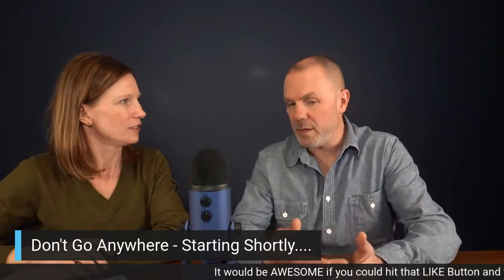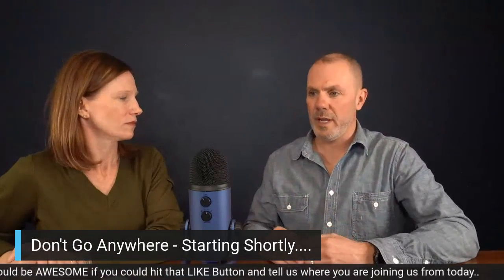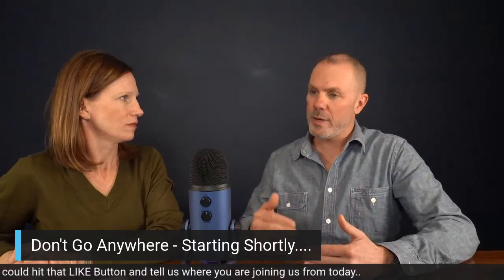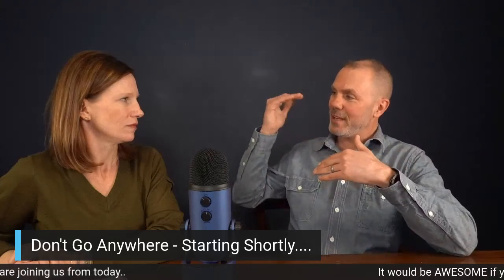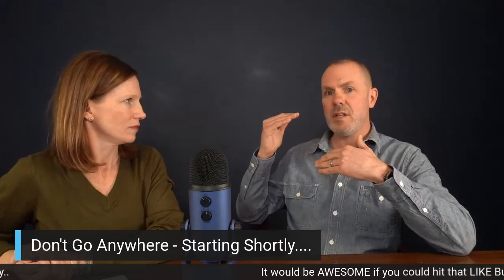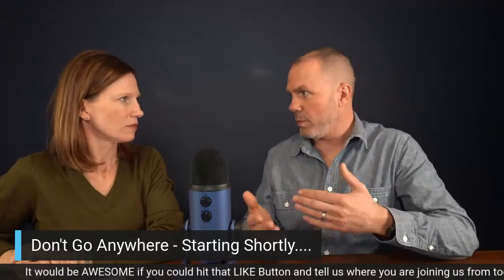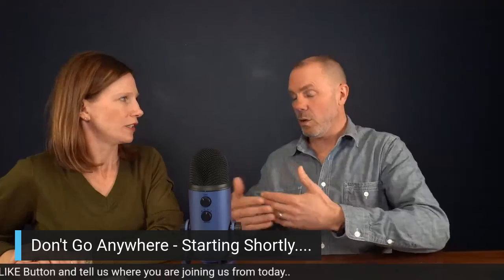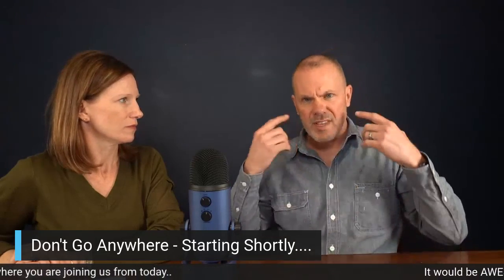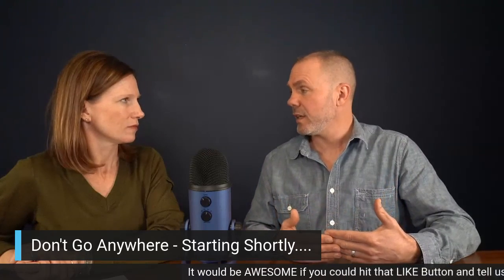Sure. Well, I'll just give you a quick one right away. Everybody wants 9-foot ceilings on the first floor, what have you. But a lot of people don't know if you go to an 8'9" ceiling with a 42-inch upper cabinet, you need less trim if you're going to do trim from the top of the cabinet to the ceiling, right? You're not doing another layer, which is a form of value engineering, right? Because maple's expensive, oak's expensive, all the hardwoods are expensive. So there's things that you can think through that translate into savings for the customers.